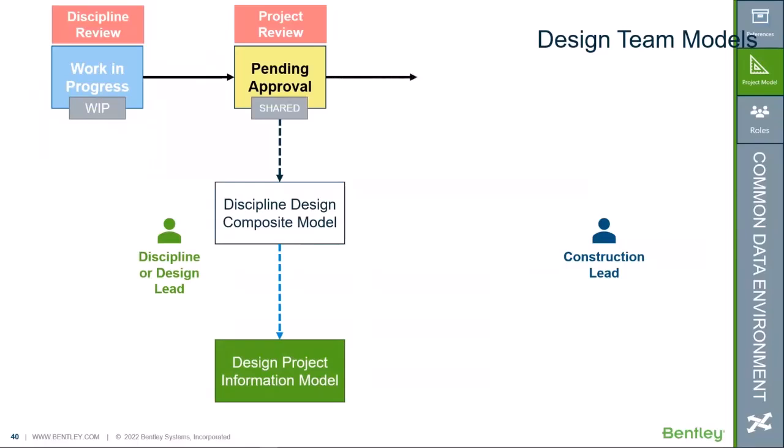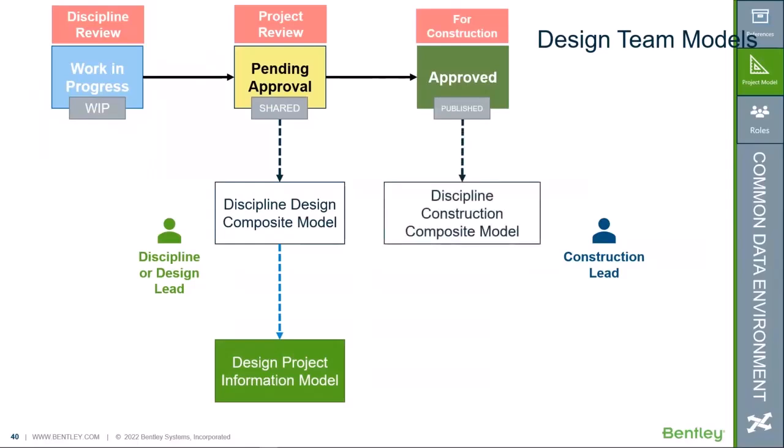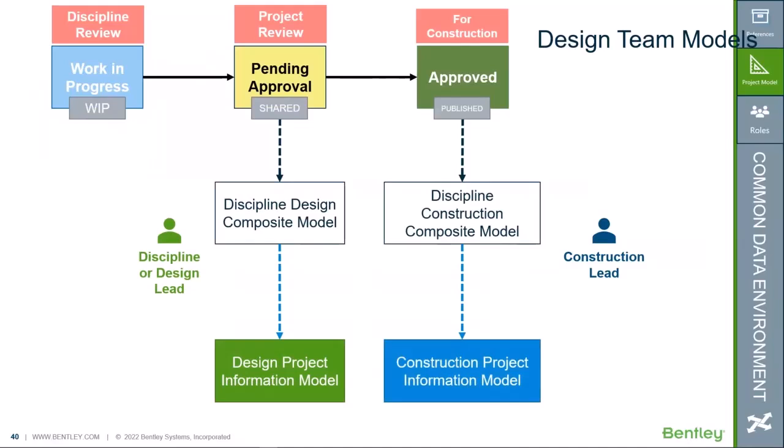Once the whole design team determines that the container is approved for construction, then the lead project manager or BIM manager shall approve the container, and then it'll be put into the construction composite model, and then eventually published into the construction project information model.